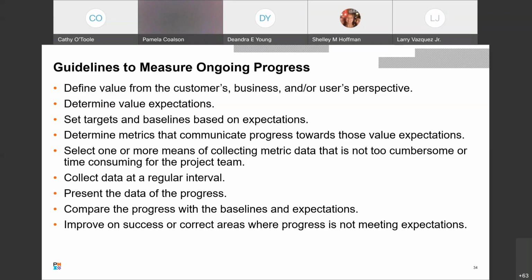And what's good is if you ask your project team for regular status. Some of the projects in our organization collect the data on a weekly basis. Some people do it on a bi-weekly basis. I think it just depends on what you're working on. Also, in the Agile world, there are Scrum Masters, which are not project managers, by the way. They're a different role and function, but as a project manager, you could take the daily Scrum Masters reports and use those to collect data